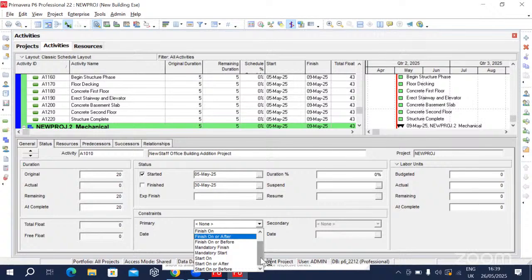You can use mandatory start because your manager has called you and said, the contractor must start on site. He's full of too many excuses. We need him to start on site straight away. You say, but he's told us the excavator cannot be on site, the road trailer has broken down on the way. He said no, the company has given them the money and they must start. So let them start. Put a mandatory start date. But I'm telling you, projects never ever go to plan.